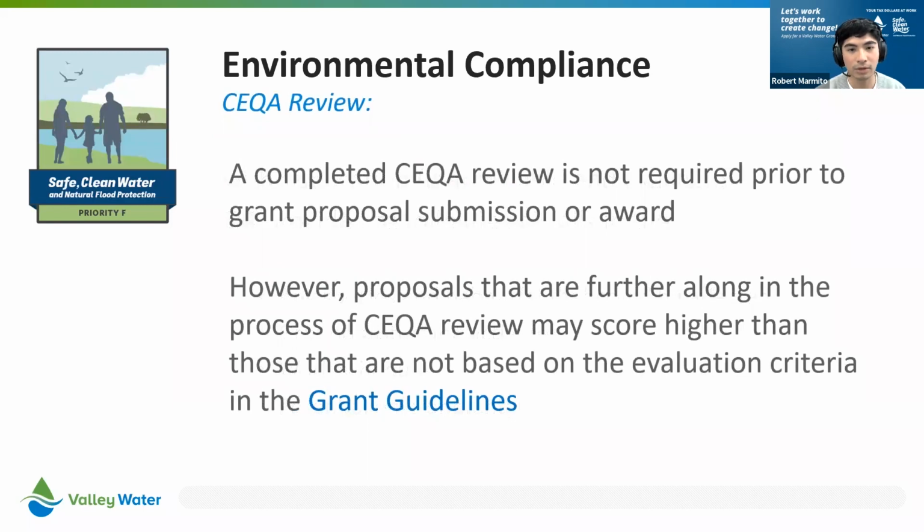Completed CEQA review is not required prior to the grant proposal submission or award. However, proposals that are further along in the process of CEQA review may score higher than those that are not, based on the evaluation criteria in the grant guidelines. Again, if you have done any CEQA research, inquiries, permits, or studies, it's a good idea to include that.